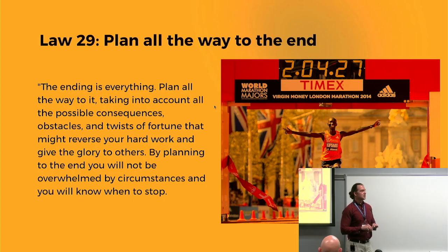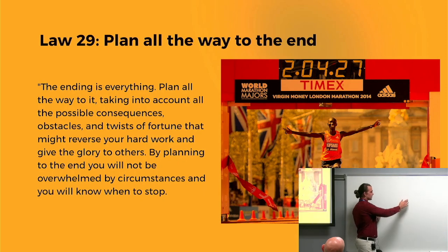The story I want to tell you is that I launched a small feature late last year, and it was supposed to go live at the end of September. I think I got everything planned. Everything was covered in my work back plan. Things were going great. And then, of course, a small issue happens, and hey, I want to get this out, but no, it's not possible. You have to contact this POC. Great, let me contact her. Oh, wait, she's gone for a week? Okay, one week delayed launch.